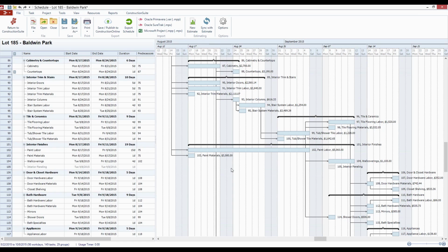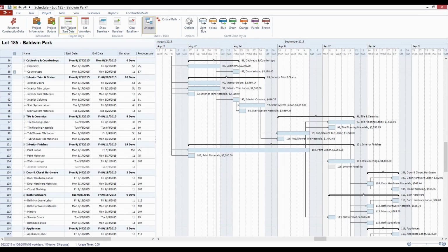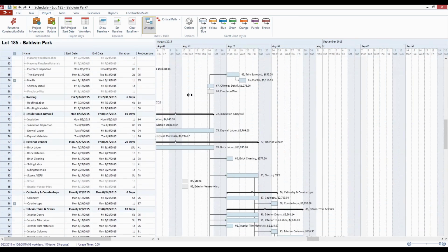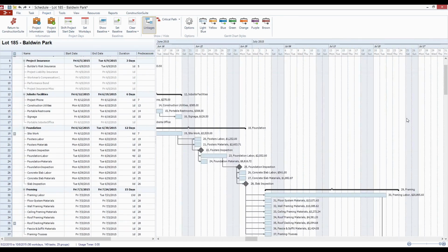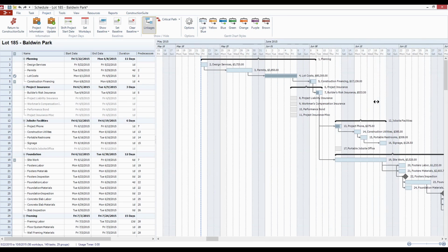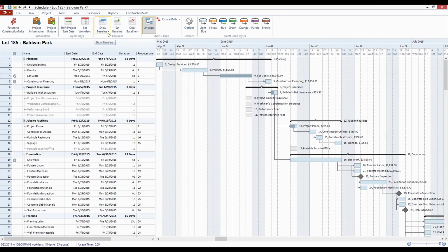Let's take, for example, something that tends to happen in every sector of construction, no matter where you are. And that is, if a project is delayed for whatever reason, or, very rarely, starts earlier than you expected. So let's say that right now we knew that the project was probably going to end up shifting beforehand. Well, we already had the schedule set up with the initial dates where we wanted everything to commence. So at this point, we want to create a baseline.